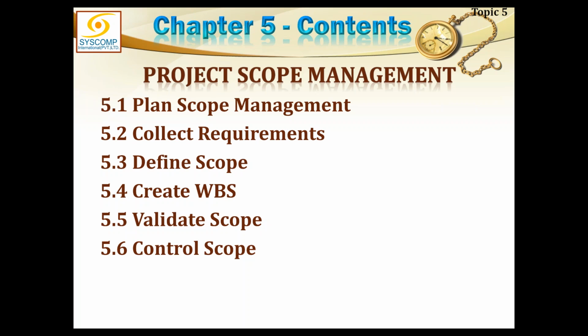And just to recall, the management plan, whether it is a scope management plan or a requirement management plan, is not the detail of the plan itself. This is just the guideline. This includes only the policies and procedures we are committing to follow in all the processes related to this knowledge area. So the requirement management plan would apply to those processes dealing with requirements, and scope management guidelines would apply to all those processes dealing specifically with scope.